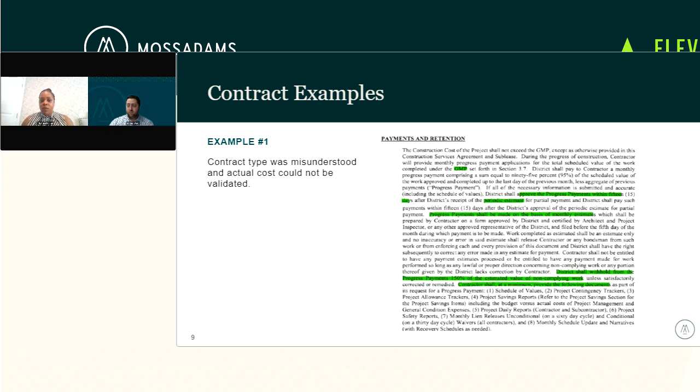That will go through a review process just to try to catch some of these exceptions that might pop up, or if there's missing documentation, or maybe the percent complete, if it's a lump sum project, isn't appropriate for what's been billed. So it's that back and forth process to review the payment application before it's submitted in its final format for payment.